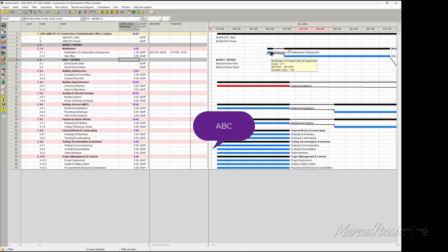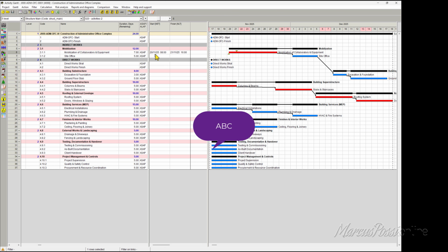But as you work just 1 day, you are not finished later. So, Control Z, keeping 7 days. Spider's calculations obey earlier than, because it is possible. But it doesn't obey the target finish later than, because it's impossible.